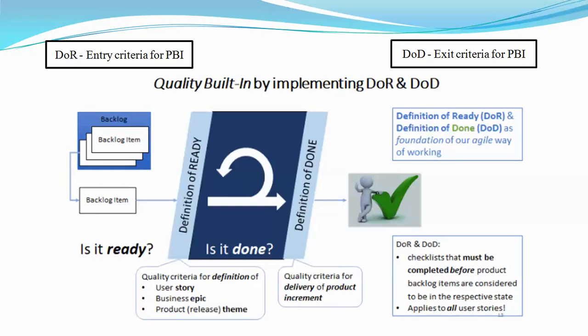It should have a proper description, right? Proper acceptance criteria, and all the details it should have, right? And then one more thing is it should satisfy the INVEST criteria, correct? So this is kind of a checklist. First criteria is done, second criteria is done. So always remember, your team and your product owner should make sure that each user story is following the quality criteria of DOR, when you are creating the story and when you are keeping the story ready.